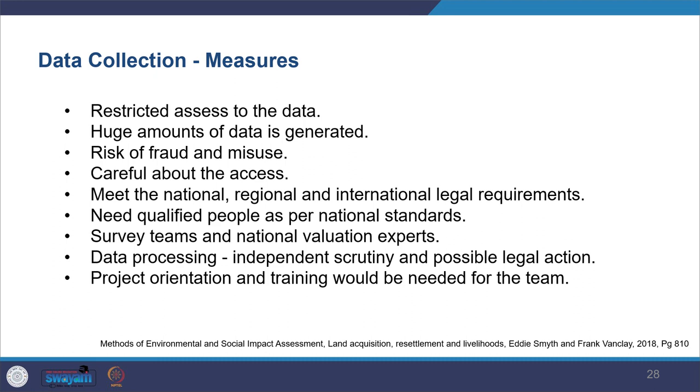Further, when you're dealing with this, you also need to meet the national, regional, and international legal requirements. So you need to also be aware of that. We have talked about legal requirements in our country, India, and then we have also talked about World Bank standards, so you need to look at all those aspects. And further, you also need to ensure that you have qualified people as per the national standards of where you're doing it. So you need to ensure that you have a survey team which are qualified to undertake these kind of work, and then any kind of objection which comes, they can independently handle it. And then also they would be requiring project-oriented training for the team purpose.